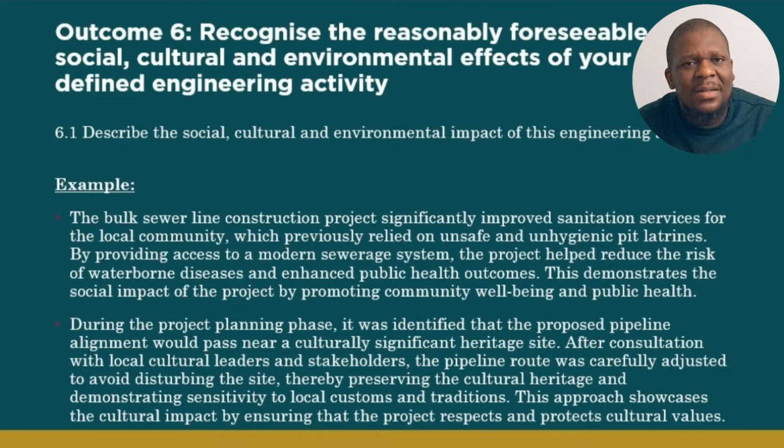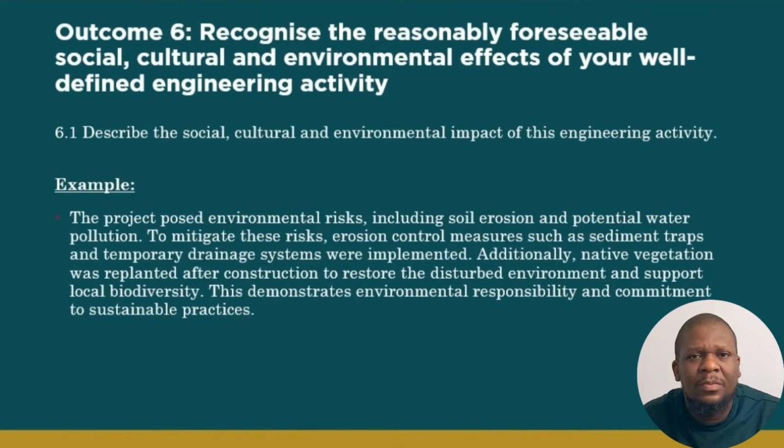After consulting with the local cultural leaders and stakeholders, I proposed that the pipeline route be carefully adjusted to avoid disturbing the site, thereby preserving the cultural heritage and demonstrating sensitivity to local customs and tradition. This approach showcases the cultural impact by ensuring that the project respects and protects cultural values.